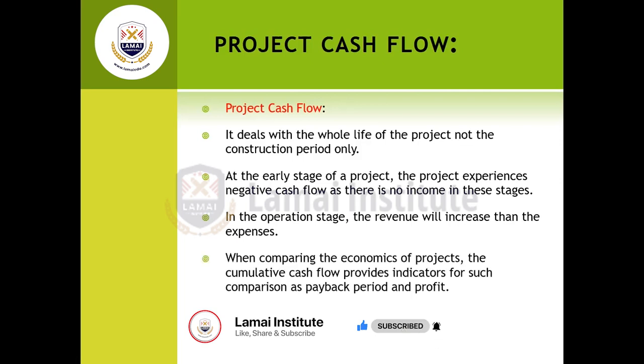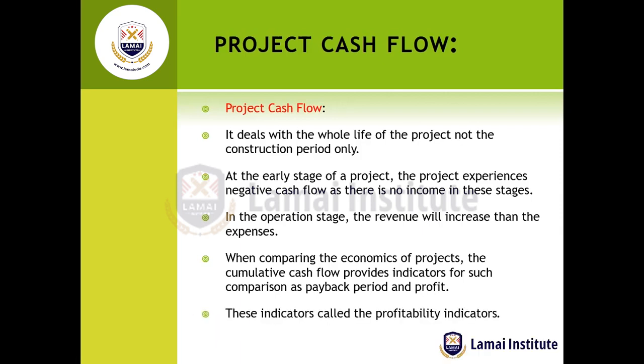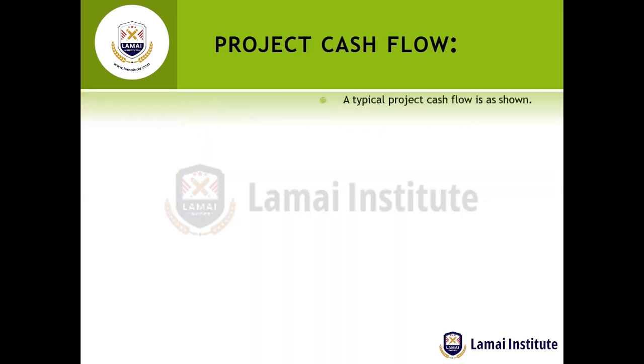When comparing the economics of projects, the cumulative cash flow provides indicators for such comparison, such as payback period and profit. These indicators are what we normally refer to as profitability indicators.